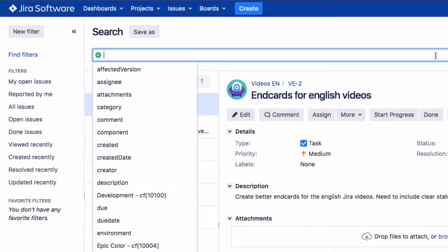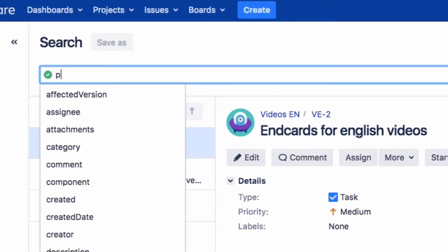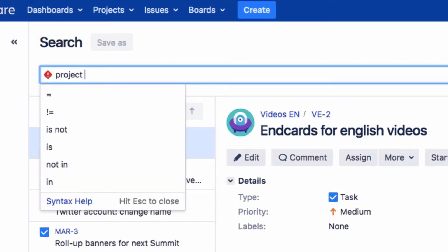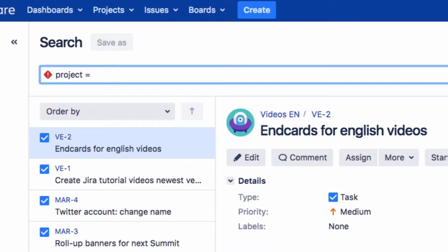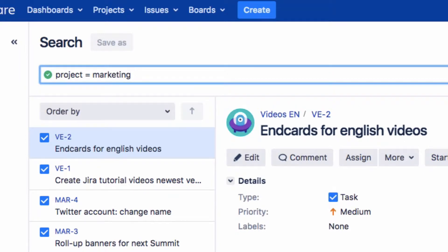Enter the search query into the search field. A JQL query consists of a field, an operator, and one or more values or functions. For example, let's use the Project field, the equals sign as the operator symbol, followed by the value Marketing. Project equals Marketing.